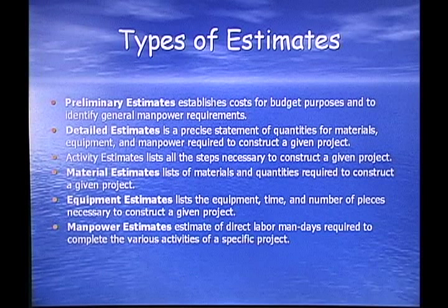Types of estimates. Preliminary estimates establish costs for budget proposals and identify general manpower requirements. Detailed estimates are a precise statement of quantities of materials, equipment, and manpower required to construct a given project.